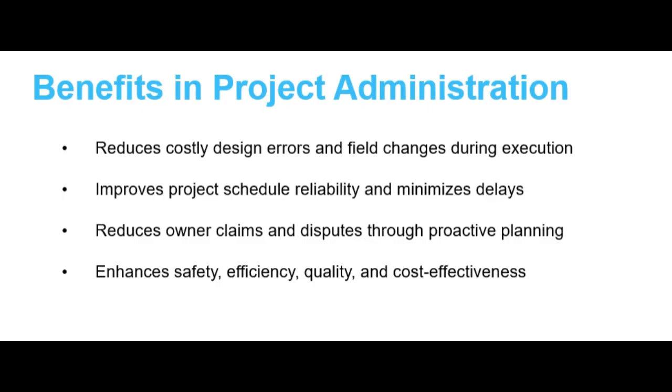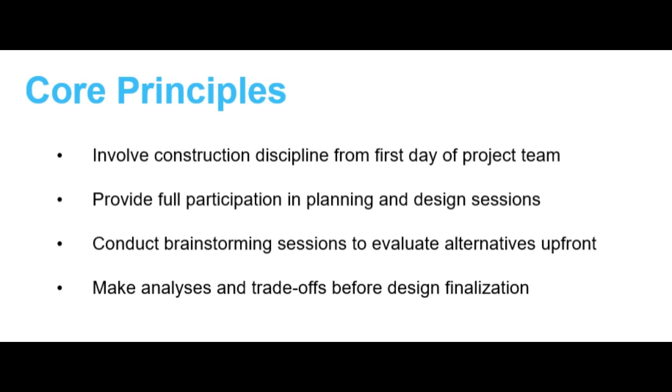Now, coming to benefits, it reduces costly design errors and field rework, improves schedule reliability and punctuality in the project, and reduces owner claims by 30 to 50 percent from the starting of the project to the ending of the project. Enhances safety, efficiency, quality, and cost effectiveness across the board. Now, coming to core principles, there are four fundamental core principles.